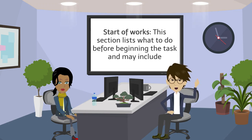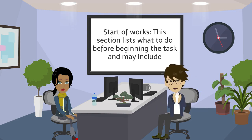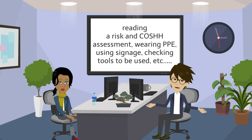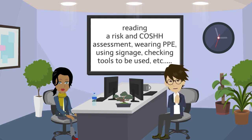Start of works: this section lists what to do before beginning the task, and may include reading a risk and COSHH assessment, wearing PPE, using signage, checking tools to be used, etc.